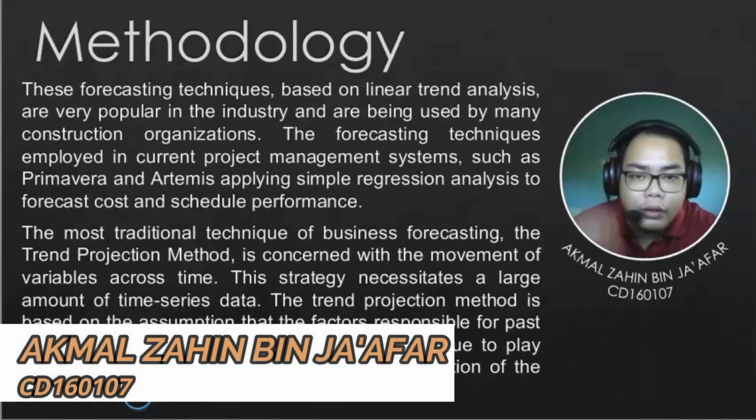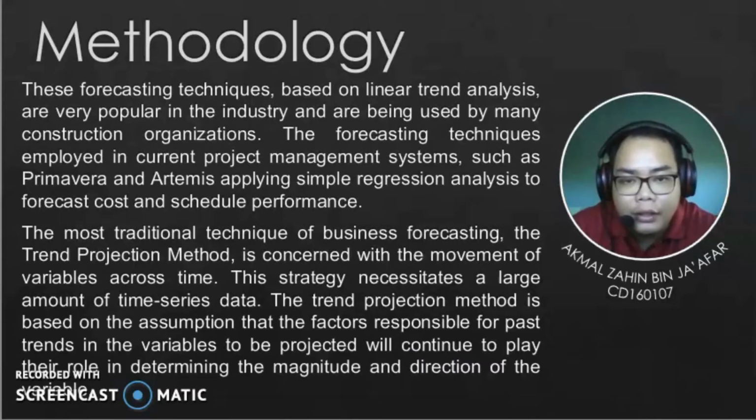I'll be continuing on the methodology, which is focusing on the forecasting techniques that are based on linear trend analysis, which is a very popular technique in the industry and is used by many construction organizations for final costing. The forecasting techniques are employed in current project management systems such as Primavera and Artemis by applying simple regression analysis to forecast cost and schedule performance.